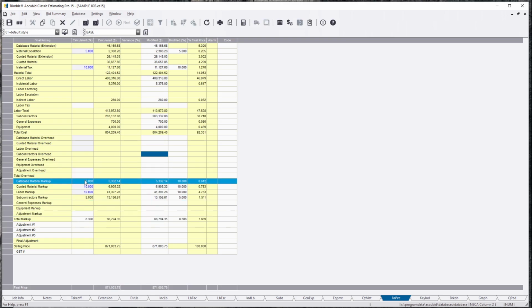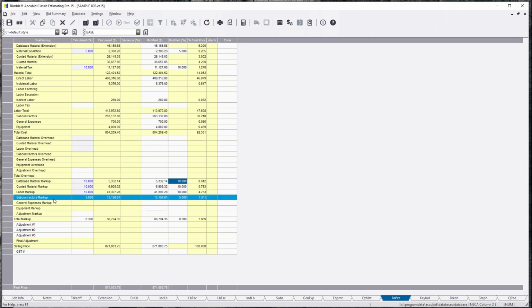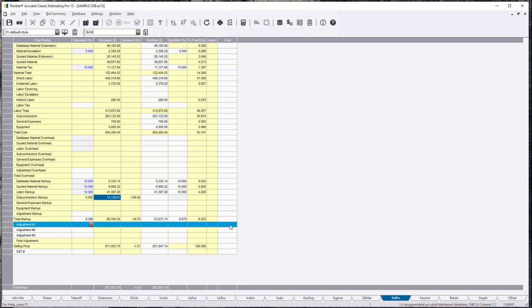And if you want, like I said in the beginning, I highly suggest just do it from here. You can save your $13,000 in markup. Maybe you could even get competitive and just say, I don't want to mark up my subs at all, and I'll figure I'm going to get $13,000 buy on them. So a lot of different ways you can do this.